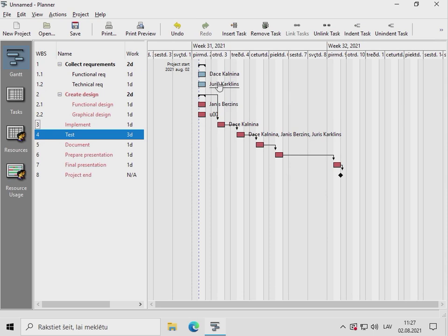So you will get a better score if for each particular task you have only 1 assigned person, because that means your plan is more detailed. Remember, if we work with the waterfall approach or V-model approach, we have to describe and plan everything, and then at least in theory even a monkey could follow this plan. But if these monkeys still need to do their own project management inside a particular task to understand how exactly they will do this, then of course you cannot claim that you just need to follow this particular plan.